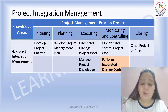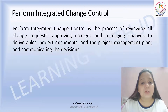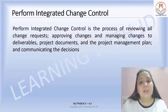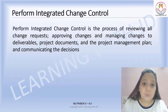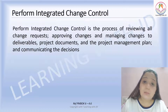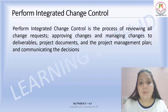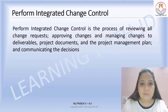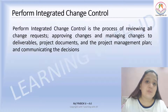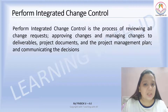Now let's understand perform integrated change control (PICC). PICC is the process of reviewing all change requests — the name itself says 'change control,' meaning it controls whatever changes are appearing on your project. It involves approving and managing changes to deliverables, project documents, and the project management plan, and communicating the decisions. If a change request is not approved, it will be declined with no impact on the project. If approved, it will be updated accordingly and become part of your deliverables.